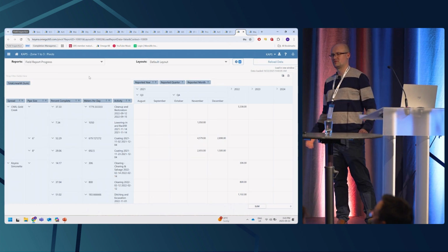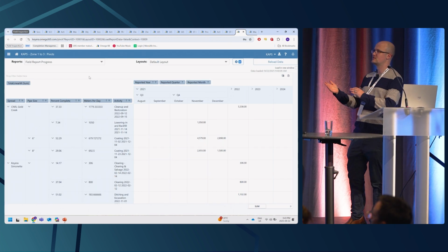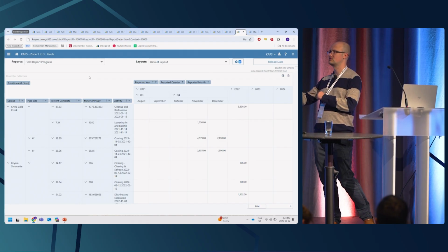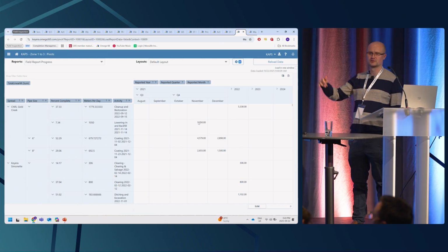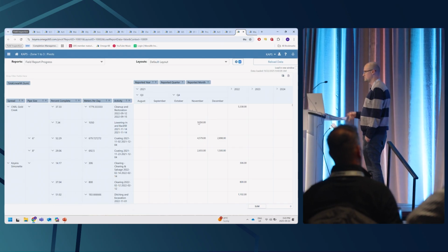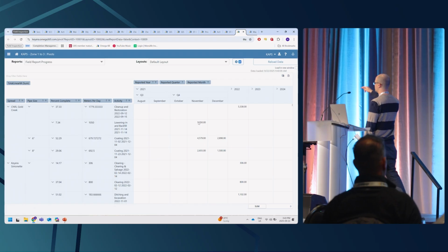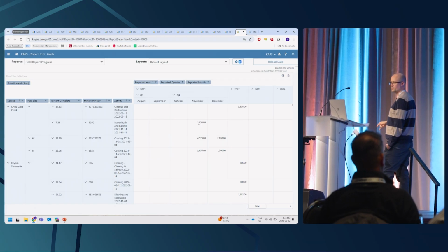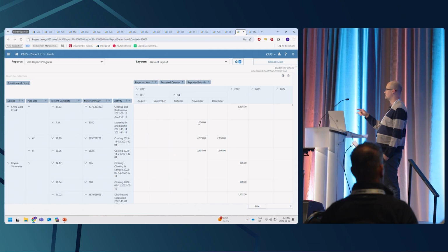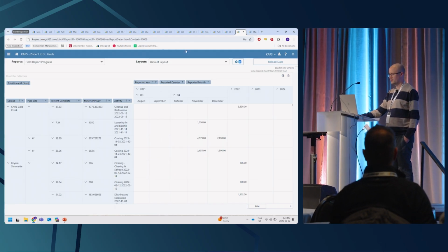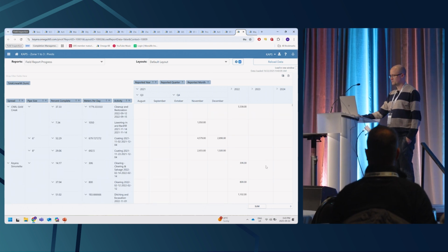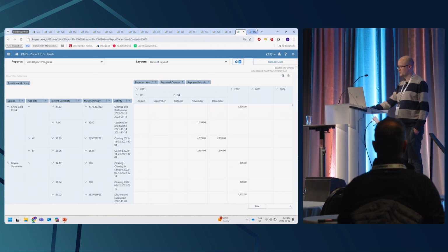And then there's more stuff that we can do with that data. So all that information that's being taken from the field by the construction guys every single day, we can then say, okay, let's make a report and tell me how far along we're working in every single month. So here I can say, okay, for lowering in November, we progressed 1,050 meters. And you can check all this information. And this is all being driven from information being collected by your construction. And for Kiara, they did tons and tons of work, and it worked out really well.